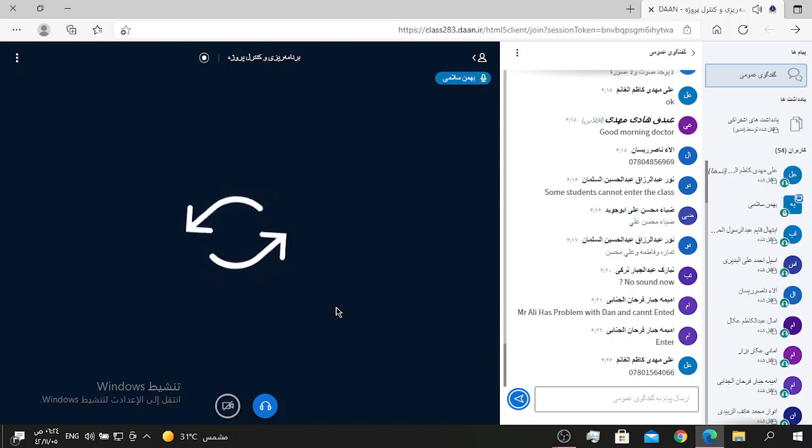The precedence diagram method, PDM, is a technique used for constructing a schedule model in which activities are represented by nodes and are graphically linked by one or more logical relationships to show the sequence in which the activities are to be performed.